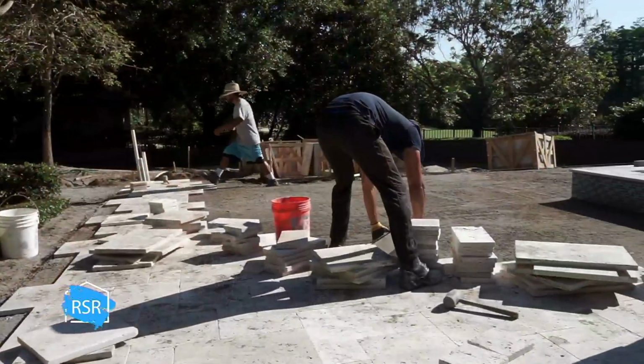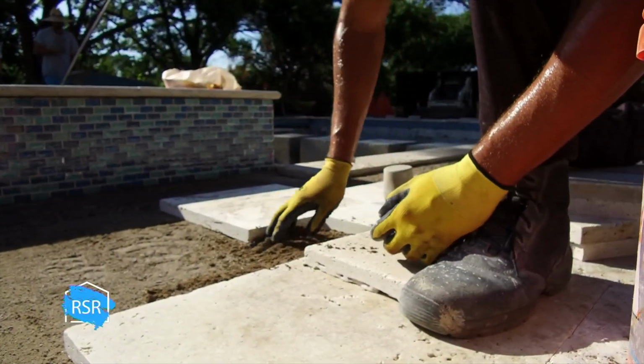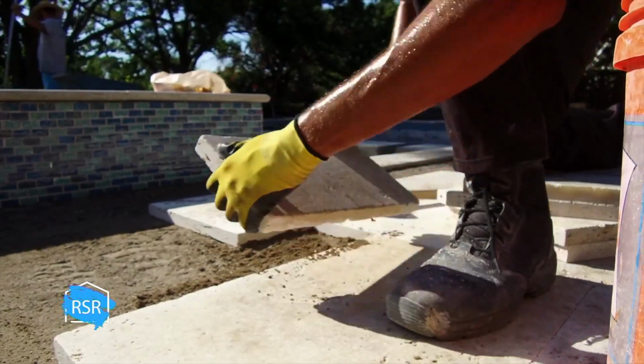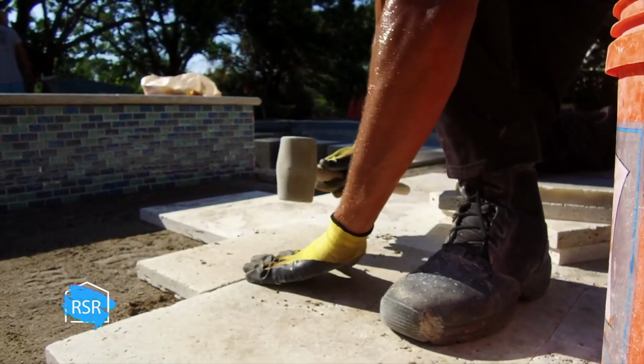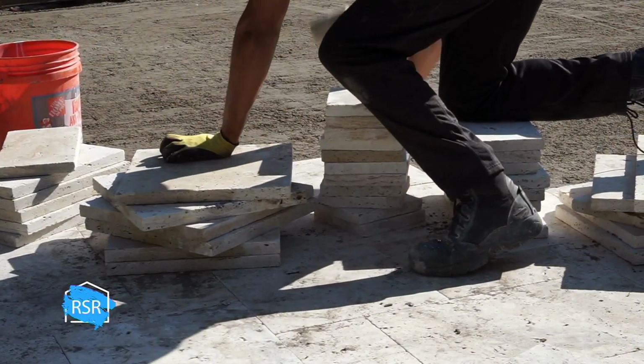How does that compromise the work site when it's all wet? Well, for a pool deck and pavers, all of that ground is prepped, graded and compacted. So if it begins to rain and the rains get very heavy, all of that work gets compromised and you have to redo it all again before you can set the pavers, or there is a potential for those pavers to sink and or shift over time instead of holding as a solid surface.